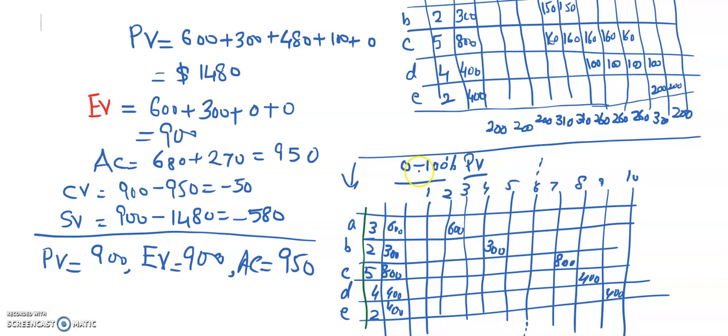There is another rule which is called the 50-50 rule, so it means 50% in the beginning, 50% in the end. So that rule can also be used, but in fact the application of that rule has been given in the textbook as well.